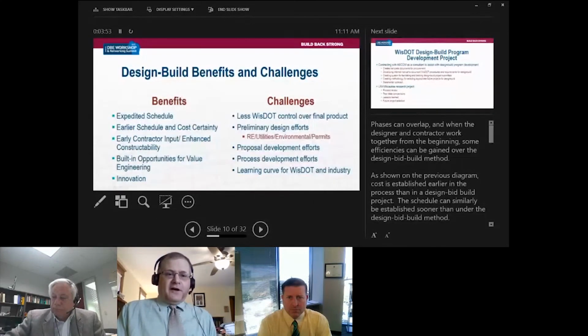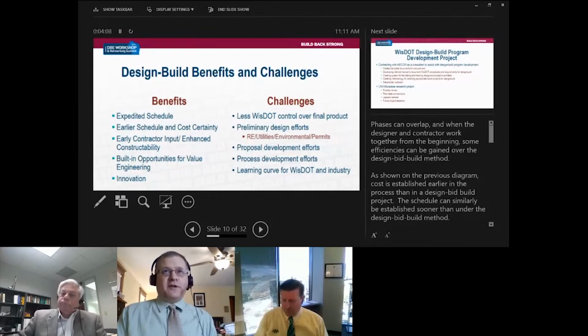Thanks. Benefits and challenges that the department has been seeing. The things that we look for in a design-build project, the reason we want to do it, would be things like an expedited schedule and earlier cost certainty. We also get an earlier schedule certainty because we'll get a schedule at the beginning of design and we'll know kind of what the design builder's plans are.